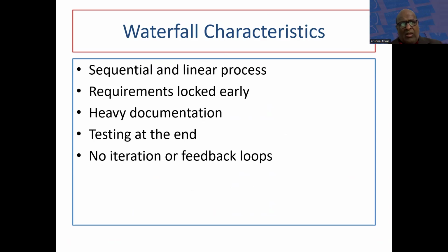We saw that the whole process is sequential and a very linear process, and once the requirements are finalized, they are frozen, then requirement changes are not allowed, and there is heavy documentation. We saw that from team to team the documentation keeps increasing, and the testers are not part of the beginning discussions, so they come at the end. And there is no iteration. Feedback comes only once the product is delivered and tested, and the customers see it and give the feedback. Intermittent feedback is not there.